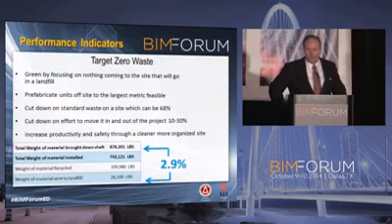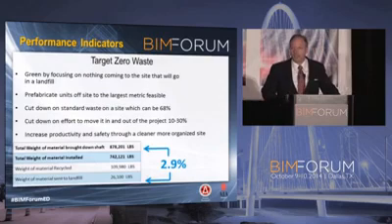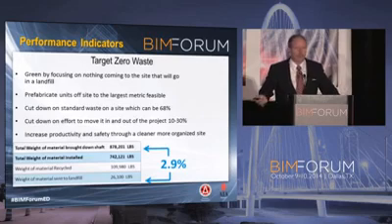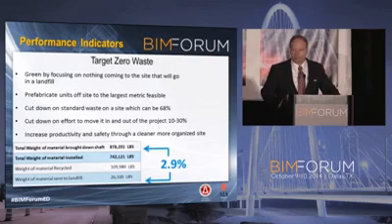It was interesting, John's point on waste. As GCs, when we would start to think about this, 15 to 20% of material is fabricated on site, that takes diesel and fuel to bring it to the job site. That takes power. 33% of all our manpower on the job site, in most cases, is moving material. So you're moving an extra 15 to 20% in, you're moving an extra 15 to 20% out for your cranes, your man lifts, your forklifts, and then we're throwing it all out.